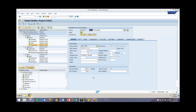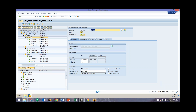Earlier I mentioned that the system will automatically schedule activities when you enter in planned dates, and that's because this checkbox defaults in — this is the schedule automatically checkbox. When we have this ticked, when we save the project, all of the activities and networks will be scheduled automatically and we won't have to manually go in and schedule them. However, for this demo I'm going to leave this unchecked and we're going to schedule these manually.